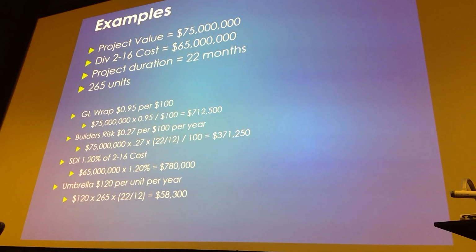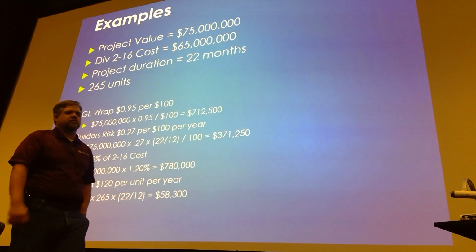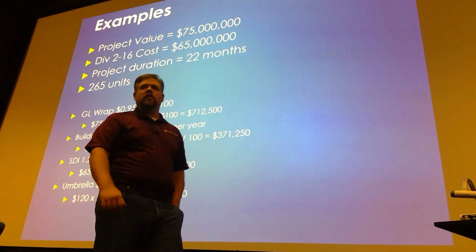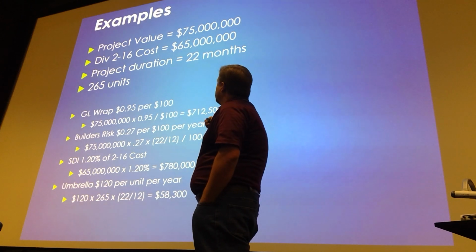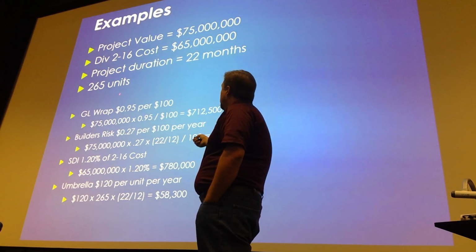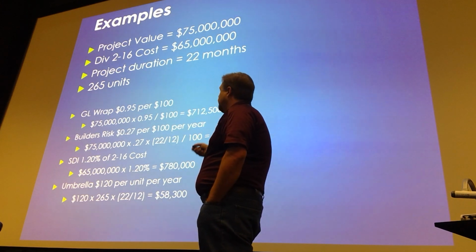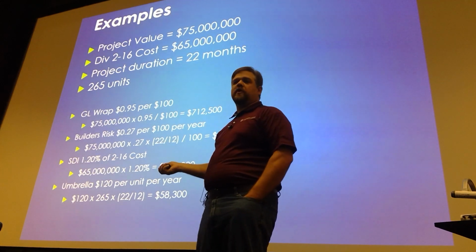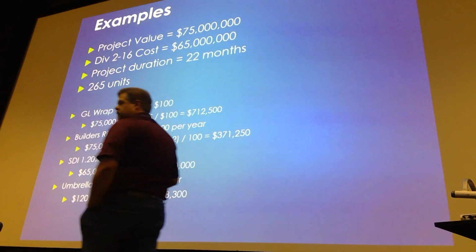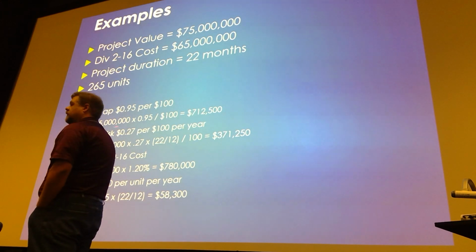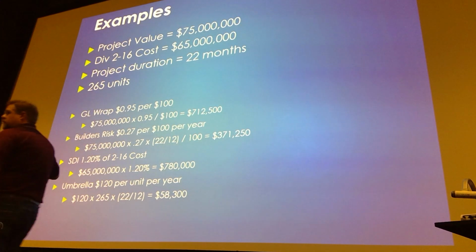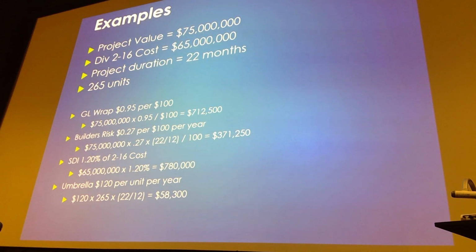I did some basic calculations here, and I'm going to expect you guys to do one or two basic sets of calculations related to insurance. The way this will look on the exam is that I will give you values and time periods like this, and I will give you a rate. I'll tell you 95 cents per 100 or 27 cents per 100. So you don't need to memorize these rates, okay? But I will expect you to know how to use it in a formula like this. It should be a gimme. It's just basically tapping stuff in on your calculator.